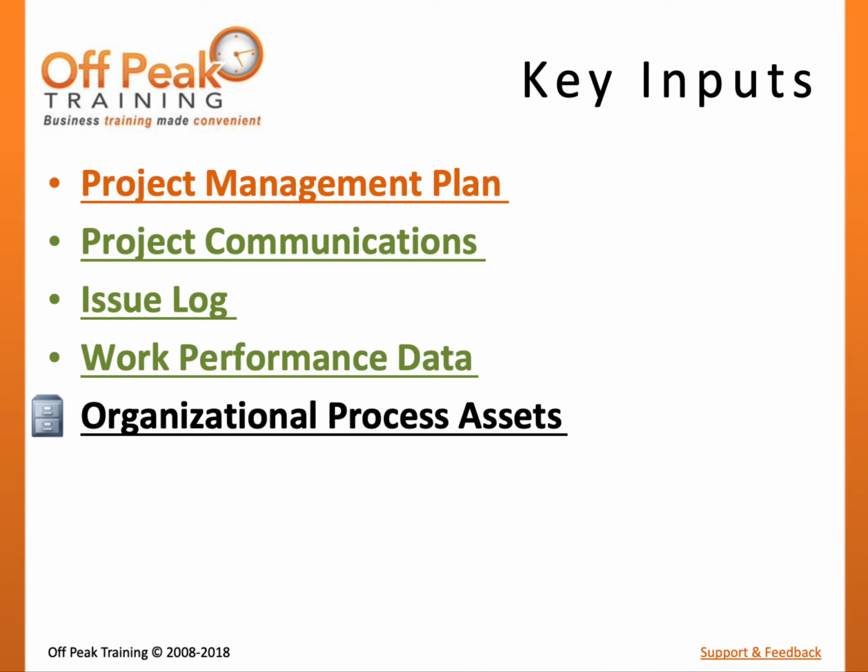The PMBOK guide defines 5 inputs to the monitor communications process. The project management plan includes other subsidiary management plans and baselines, such as the communications and stakeholder management plans. These may describe the frequency and approach that will be taken for the monitor communications process. Project communications, the key output of managed communications, may include the reporting of project performance and the status of deliverables.